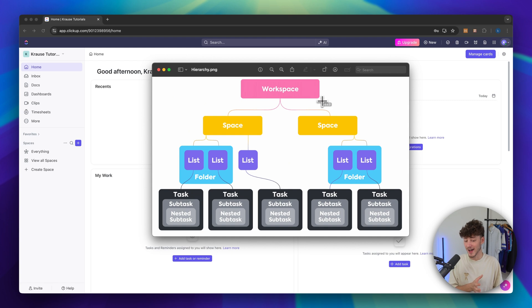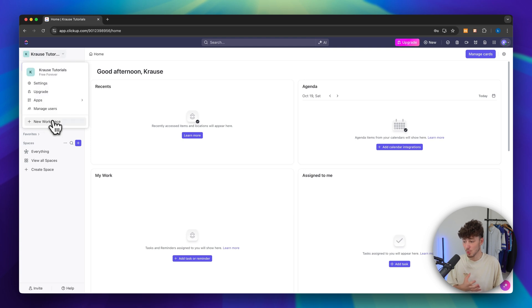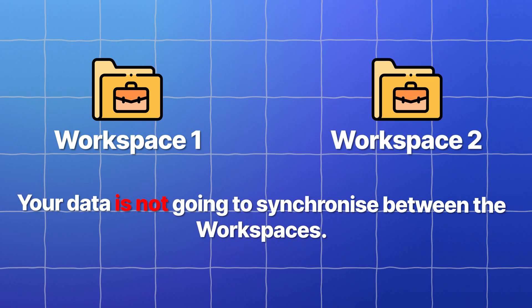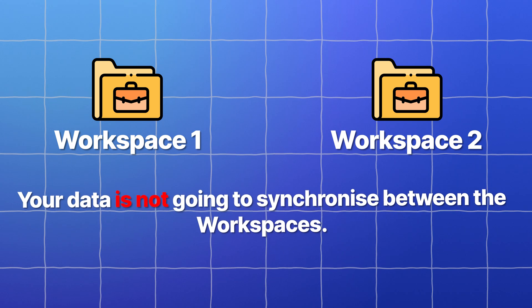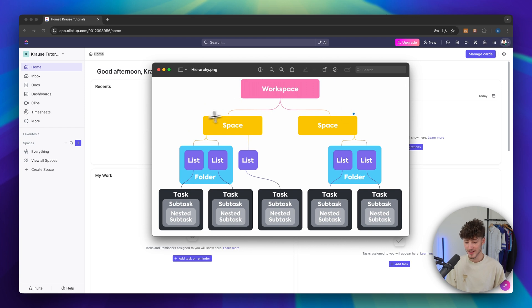Before we dive into all of the spaces, lists and so on, it is actually super important to understand how your ClickUp account structure and how the ClickUp hierarchy is going to work. On the far top of your hierarchy, you do have your workspace — this essentially is the top level container for your projects. Please note that if you are going to create a new workspace, all of the different spaces, lists and so on aren't going to be added across all workspaces — these are two completely different things. For example, I run a media company and I have different workspaces for different YouTube channels because each of these channels are going to have different lists and tasks. Under our workspace, we then have different spaces, so let's actually create a space right now.